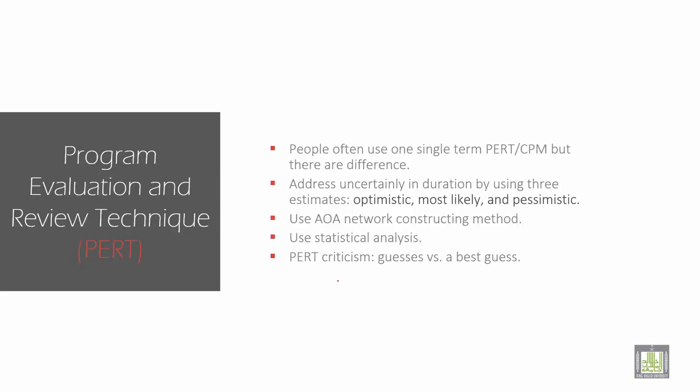Then PERT. What is PERT? PERT is Program Evaluation and Review Technique. People often use the single term PERT and CPM, but there are some differences in this method. We have three estimates: Optimistic, Most Likely, and Pessimistic. I have shown you in the previous slide. Optimistic is the fast time, Pessimistic is the slow time, and Most Likely is the normal time.